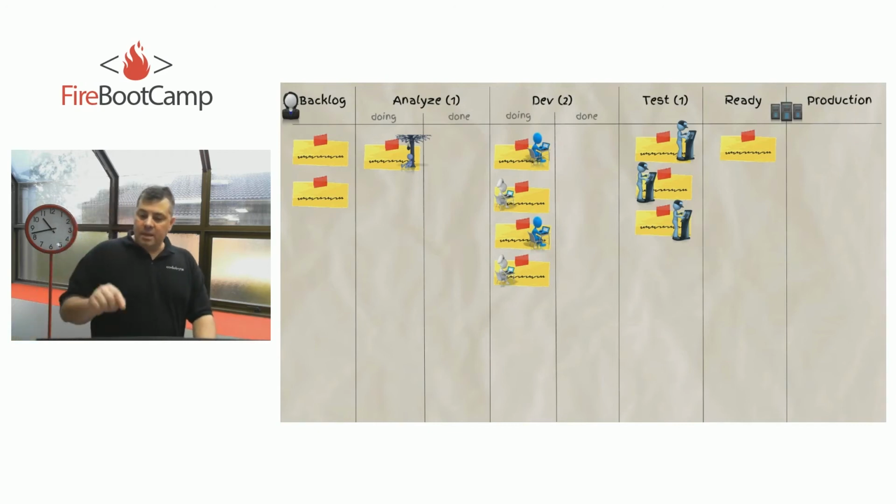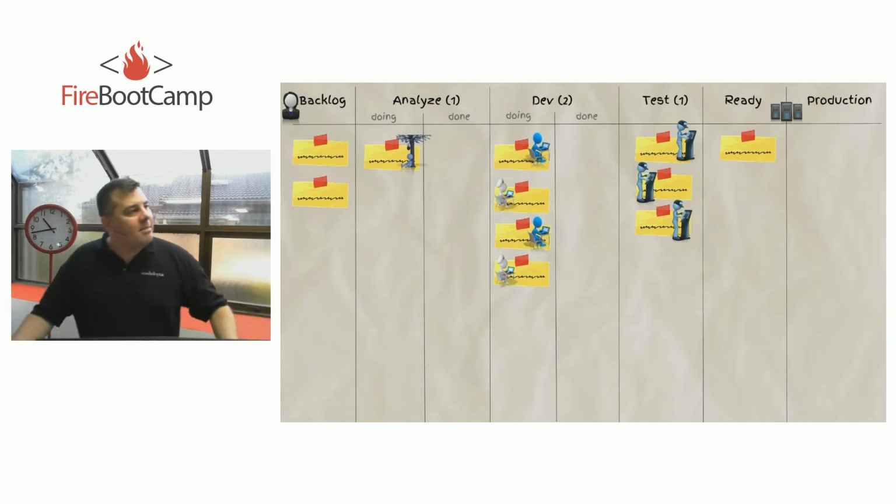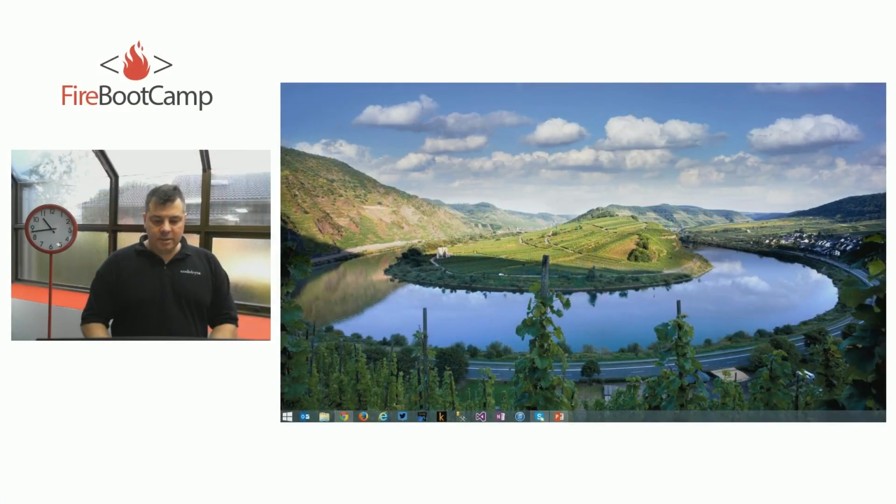You will deliver more. So with this though, remember, this was where we left our Kanban board. All these guys are working on different things. We do have a problem here, don't we? Can anybody see, if I have a Kanban board like this with those WIP limits at the top, do I have a problem here? Do I have some mistakes on this Kanban board? Would you have a bottleneck at the analyze, because you're only analyzing one thing at a time? And you may. And we're going to talk about those bottlenecks too. So maybe we'll push it to 2. Let's push it to 2 then. Let's work on this.